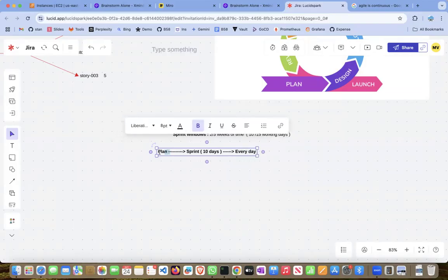Here you have planning. In the planning itself, we discuss what task needs to be delivered, what the goal is for the current sprint, who is going to deliver it and who is going to do what, and for this particular story or feature, how many developers are needed, how many testing resources are needed, and how much effort is needed. Once planning is completed, the scrum master will start the sprint.